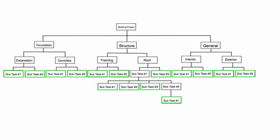We'll have to excavate, we'll need some concrete for the foundation, we'll need to build the frame, the roof, etc. And then you keep breaking those down into more and more subtasks until you have all of these work packages which are completely distinguishable from each other.